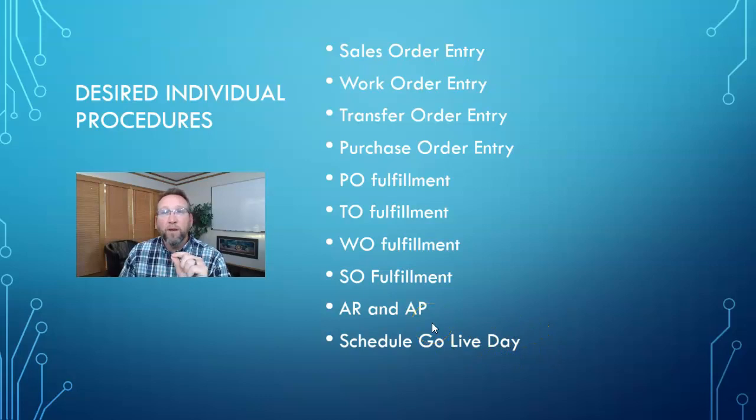Once the individual procedures are completed, that's a good time to schedule the go live day. At this point, we'll know when we'll be ready to go live, because the only thing we have left to do is create a go live checklist and train the users and give them adequate time to practice. So now at this point, we're ready to schedule the go live date.